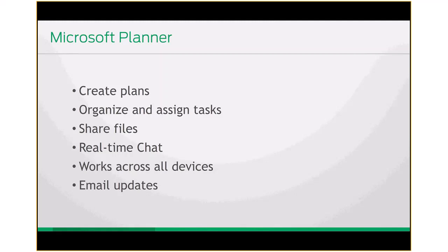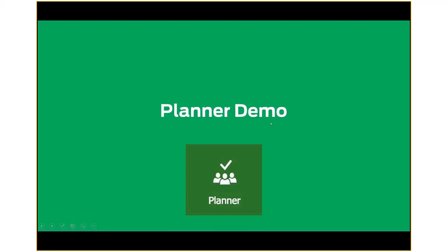Microsoft Planner is better suited to small efforts that don't have a ton of people, where due dates and deadlines are important, but there's not schedule dependencies, there's not a lot of the complexity that you have to try and bake into a project plan. Planner is good for that, and it follows the more modern idea of drag and drop tiles. Basically, it's a Kanban board. So we're going to take a look at Microsoft Planner. Let me bring that screen across here.